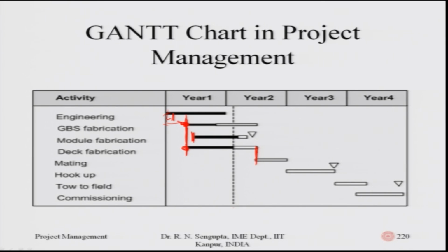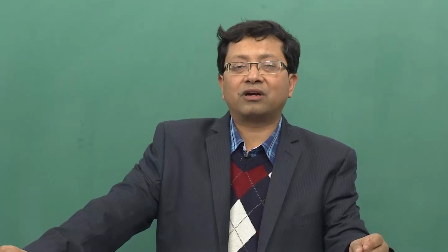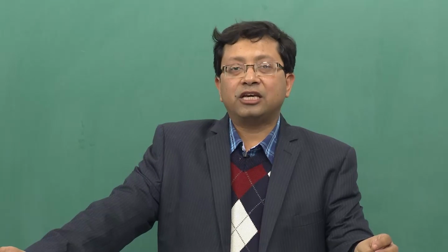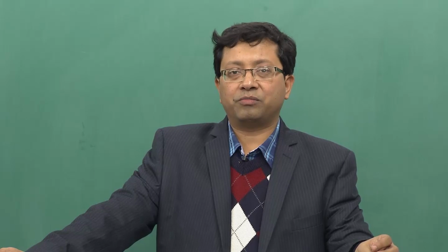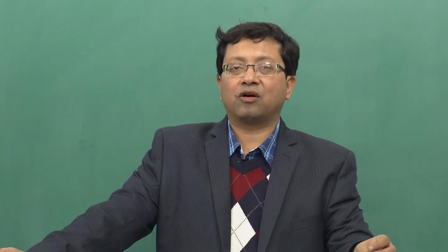deck fabrication and mating work, the overall time difference between the ending and the starting is 0. It may so happen that due to some circumstances, some resource constraints, this goes further to the right, that means delay is there, and the overall project can be shifted. So, these Gantt charts give you in a very simple sense how the works are related to each other and what is the overall time frame taken for each activity for the project, and how there are slacks which can be utilized in order to minimize any overshooting of the time for the project as such.